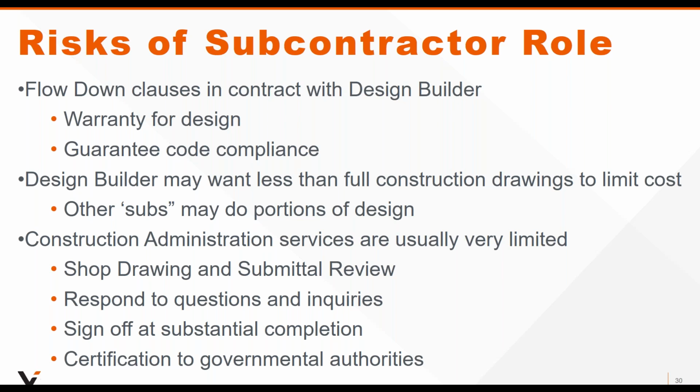Your construction administration services are usually very limited. Depending on how the design builder has set it up, you may be doing submittal reviews, responding to questions and inquiries, sign off at substantial completion, and then certification to government authorities.